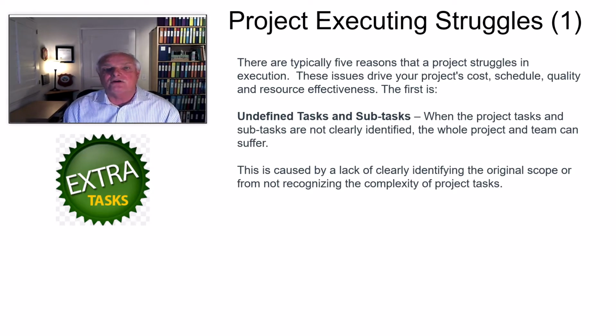Other times you go ahead and do it and you recognize that you're doing it. It's out of scope. It's out of budget, which means I have to cover it somewhere out of program or project management reserve, which means that I may end up at the end of the project, if it hasn't been approved, with an overrun based on trying to complete this.